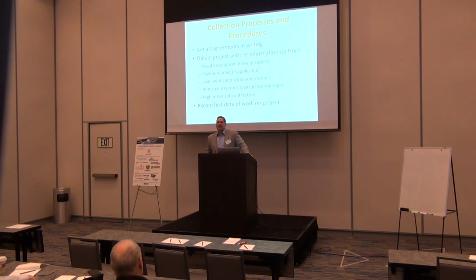Probably, it depends. If it's something you could bill for as a stored material, then the contractor would get it. If it's something you just stored there because you were planning to do that, then you would be entitled to it. If it's something unique to that project and there's a restocking charge, you probably could get some kind of claim on that as well. I've had that happen before, where somebody has a custom-made product, and that's a reason why you want to try to bill that early on as a stored material, because then you have to pay for it. Most contracts don't offer useful material very often.